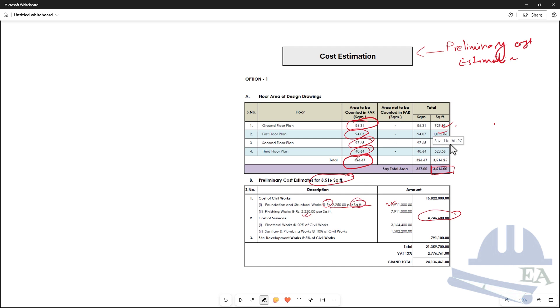This is for estimation purposes only. During construction, you prepare the BOQ, and based on the BOQ and the rate of each item, you get the total cost estimate and do the total billing as well.